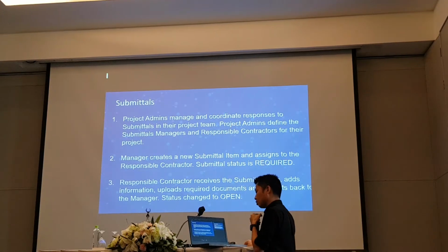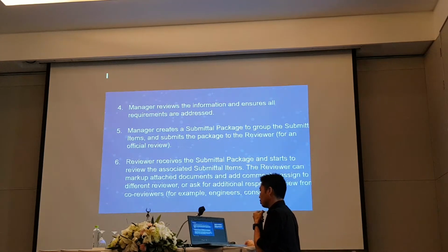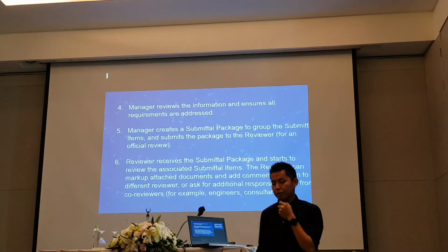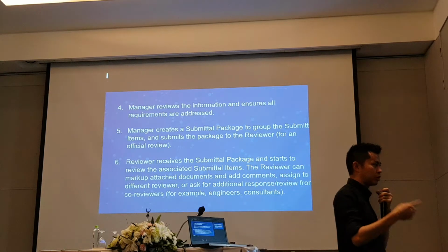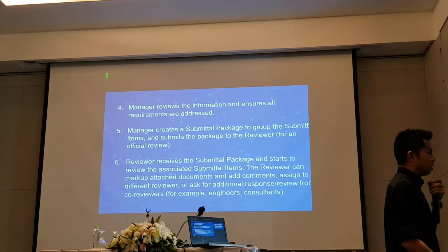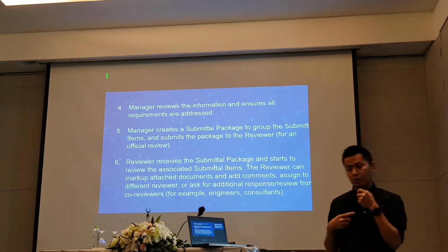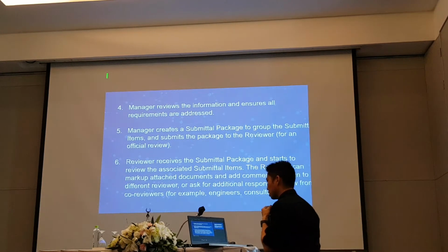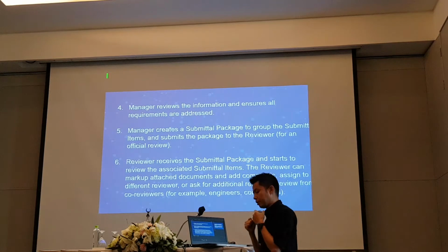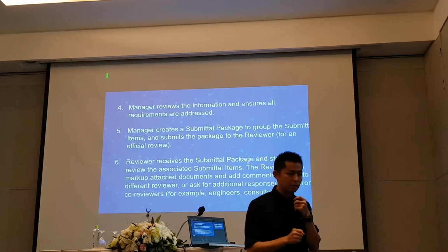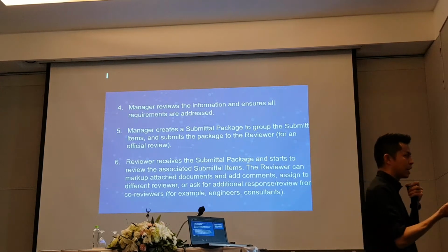Alright, the status will automatically change. Now, once they're done, the manager will review again whatever the contractor filled in to make sure that all the requirements or the questions or the requests are being addressed. By the time they feel that, hey, everything is in order, they will create a package based on this item.